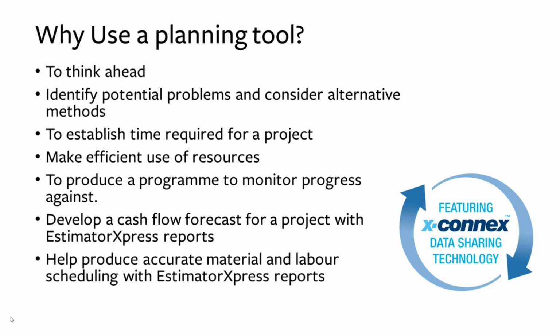As this goes through and you're updating the dates, you can keep track of your cash flow forecast for the project. So you can see if the delays on the project are going to impact on your cash flow, and also if it's going to impact on your material and labour scheduling as well, which with the export back to EstimatorXpress allows you to produce those reports.